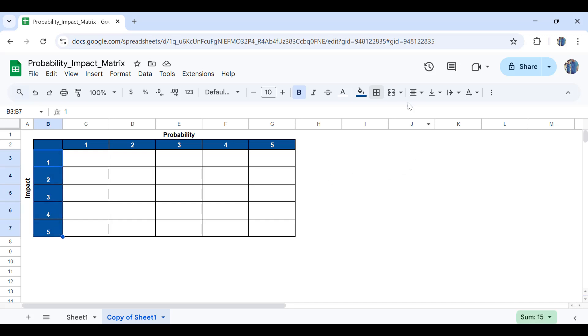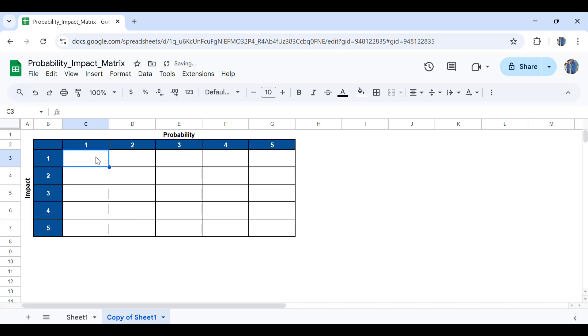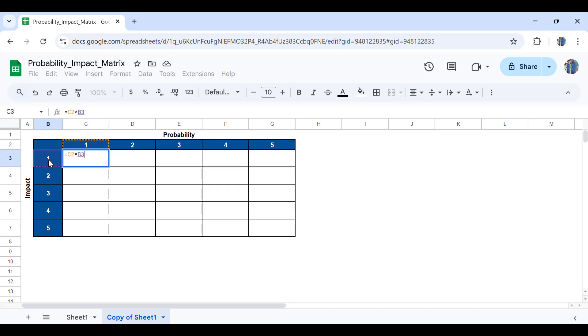Let's bring these to the center here. So now if I am going to score and position specific risks, what I'm going to do is use a simple multiplication function. So I'll write down equal sign, probability here multiplied by the impact.